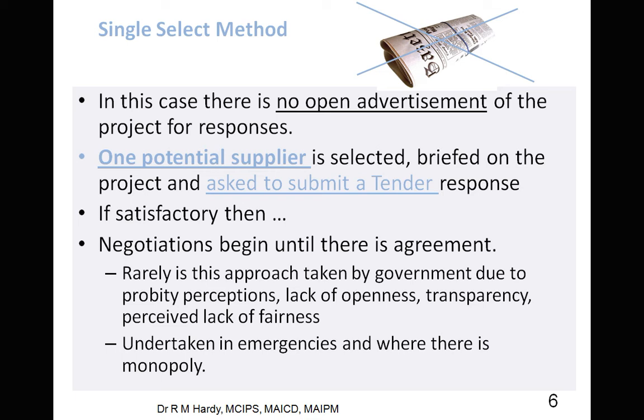So where does post-tender negotiation fit into that? So all the prices come back, they're all similar, but you still want to make some variations from there. Once you have signed a contract with one builder, then you can talk to them about anything you want. So generally, when you have post-tender negotiations, that generally has to go back to all the tenderers. In truth, that's the proper way of doing it. All the tenderers need to be given the same chance to resubmit according to the new conditions. Okay, that's doing it properly.